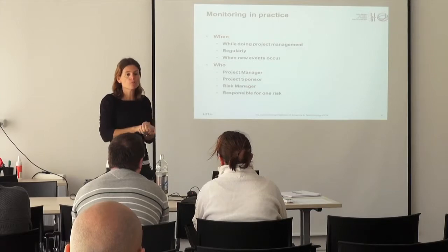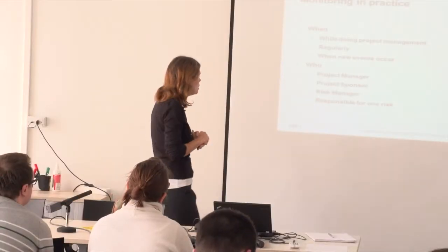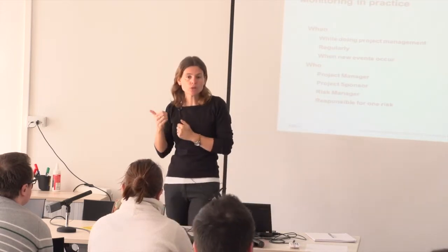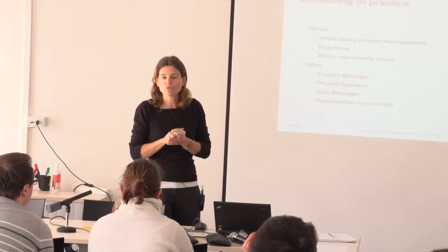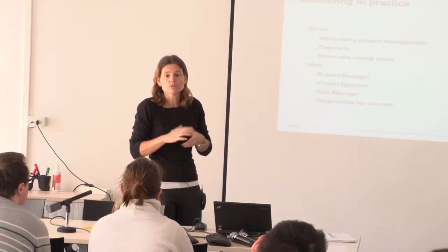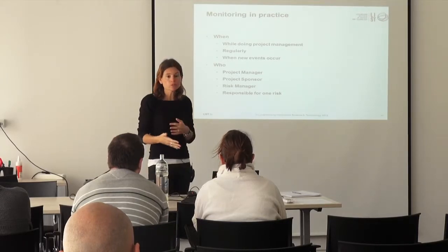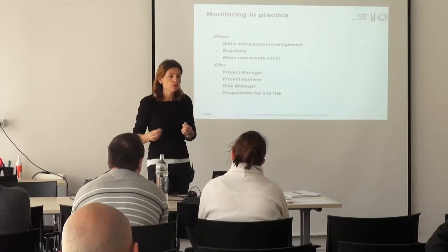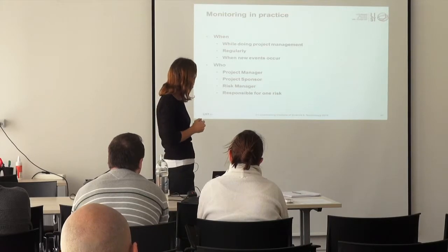So you come to the project and look at it with the risk manager review. And as we said, you need to assign one responsible for each risk. It might be the project manager for every risk in the project. For some risks, the project manager is not really competent to understand whether that risk is there or not, or might not be the best person to monitor the risk. So assign somebody else in that case.